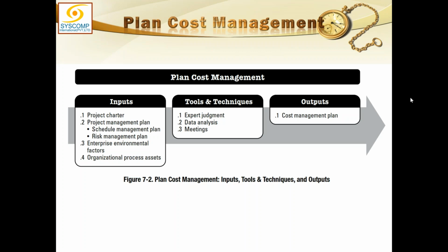This is the acceptance range used in determining realistic activity cost estimates, which is specified and may include an amount for contingencies. So this is plus minus how much is okay with you. Whatever you think is going to be the cost of it, plus minus this much percent is the fluctuation allowed.